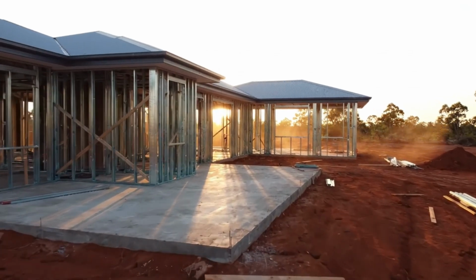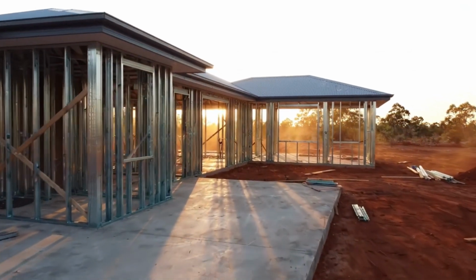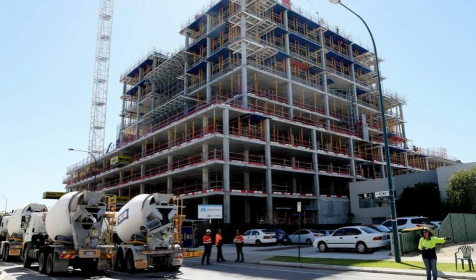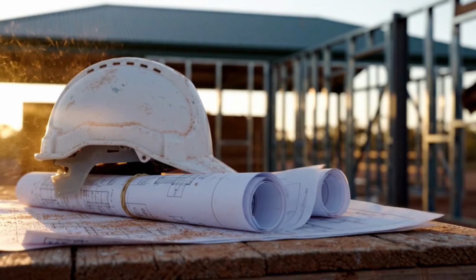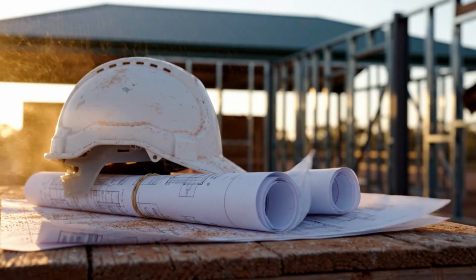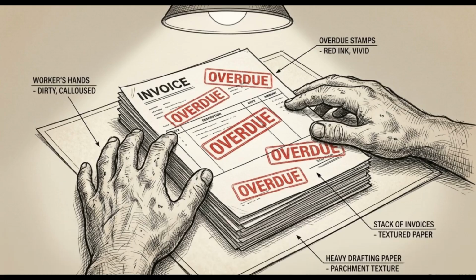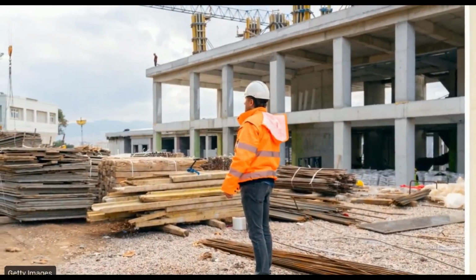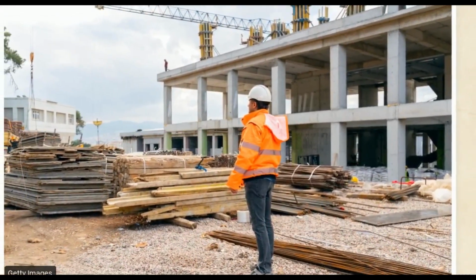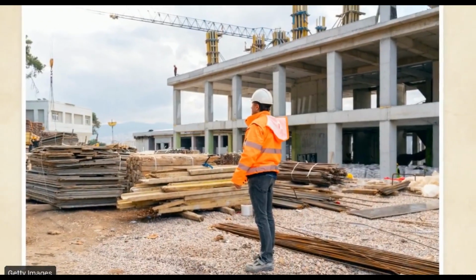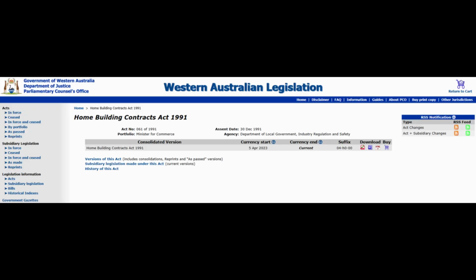Between 2018 and 2024, the Western Australian construction sector saw major builder collapses. Subcontractors absorbed financial losses exceeding $1 billion. When a head contractor fails, the subbies lose their money. But when a subbie fails, the builder inherits the cost. They are left with a stranded site and the responsibility for every defect left behind.